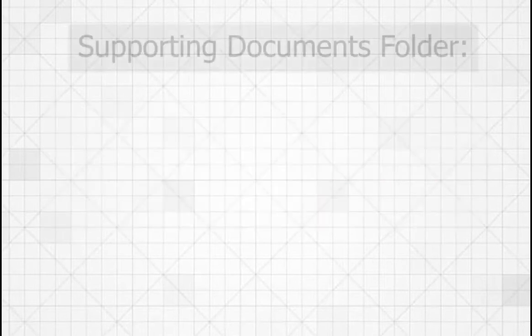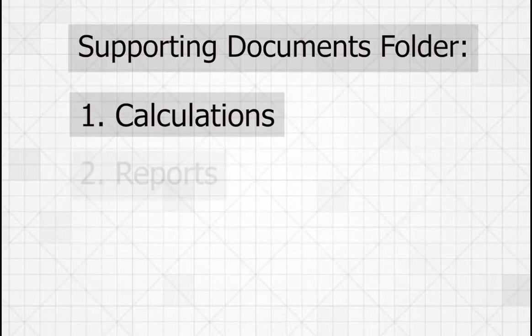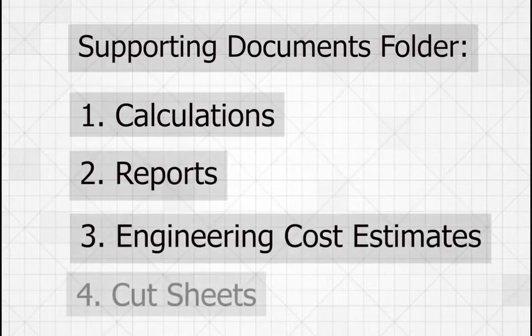The supporting documents folder includes documents such as calculations, reports, engineering cost estimates, and cut sheets.